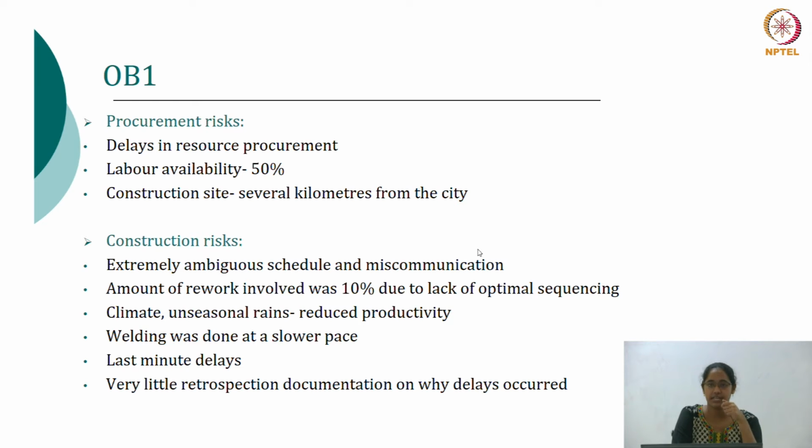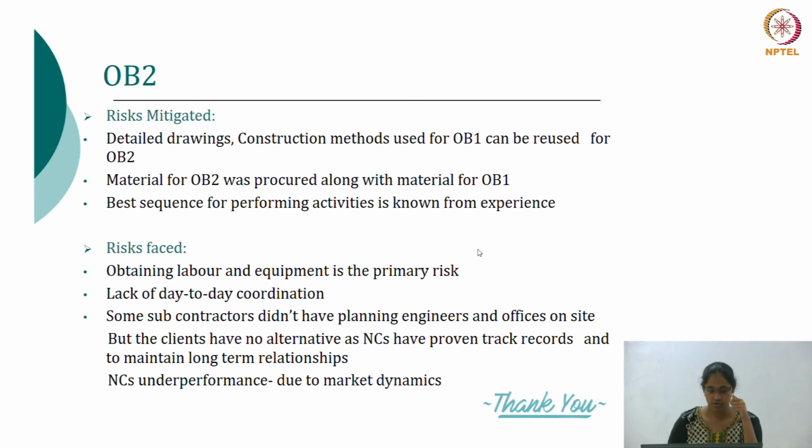There were last minute delays. The client got to know the details only at the last minute. Then there was no clear documentation on why the delays occurred. So the client felt it was due to the inefficiency of the project management consultant. So in the second building, they planned an in-house project management system, so primarily they would take care of the management themselves.